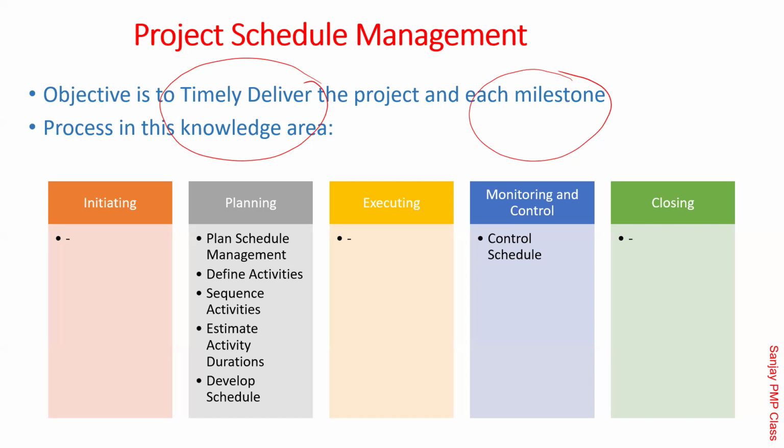Your money will come from that, Shishir. When you complete the design phase, your 20% money will come. Have you come across these types of contracts? Yes, that's very common when buying a flat. Exactly. But even in our cases, it is like that, isn't it? The customer doesn't pay you everything right in the beginning. And if the customer said that I will pay you everything in the end, you will have a problem. Correct, Shishir? So there are interim milestones. Now, these milestone-related payments, the customer would not like to keep linked only to the timeline. He would like to link it to the deliverable, correct?